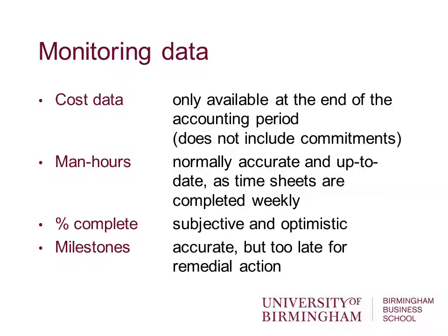Man hours, or people hours should I say, I'll probably change that next time I think, is normally accurate and up to date as timesheets are completed weekly. The percentage complete is subjective and normally optimistic. There's a certain bias which people have in assessing how much work they've actually completed, as I'm sure you can all testify to when you're thinking about your assignments. And milestones are always accurate but tend to be too late for any action to be taken.